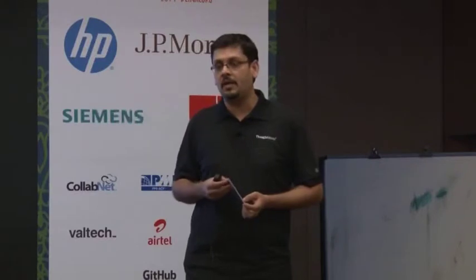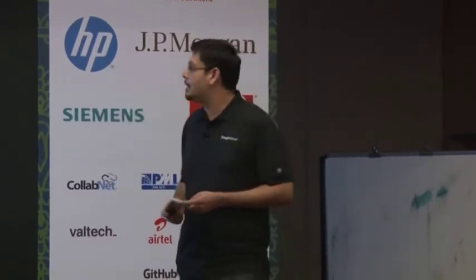So every distributed project where there is going to be active development in multiple locations, we try to make sure there's cross-functional roles, including user experience designers if needed, but we'll try and make sure that there is no specialist role that only exists in one location.